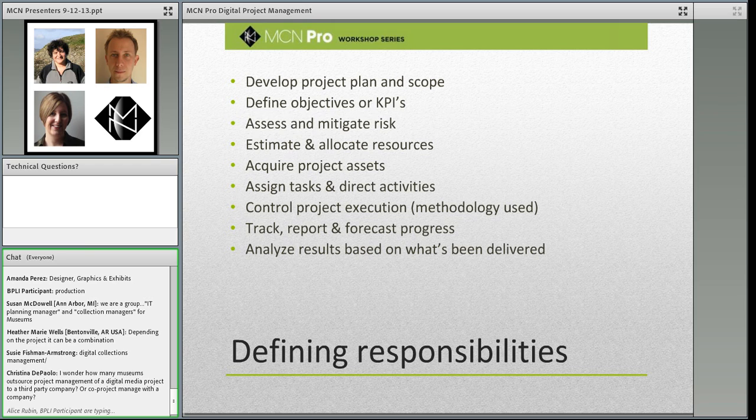That as a project manager in the digital world you tend to face. But some of the most common ones, I would say from experience, is setting the project scope and keeping to it for the duration of the project, no matter whether you're employing agile or waterfall methodology. The scope should not increase. It could change, but it should not increase.